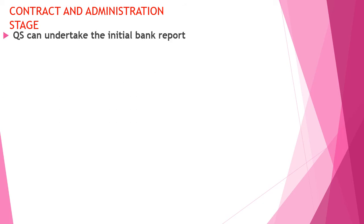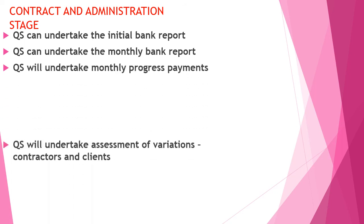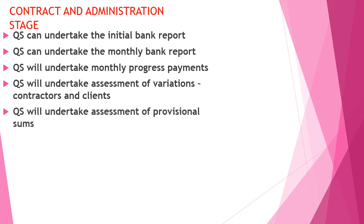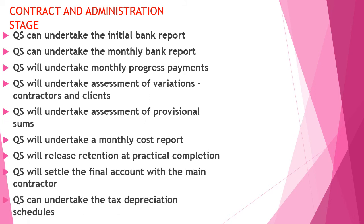In the contract and administration stage, the QS undertakes the initial bank report and monthly bank reports, undertakes monthly progress payments, ensures assessment of variations for both contractors and clients, assesses provisional sums, produces monthly cost reports, manages release of retention money on practical completion, settles the final account with the main contractor, and checks tax depreciation schedules.